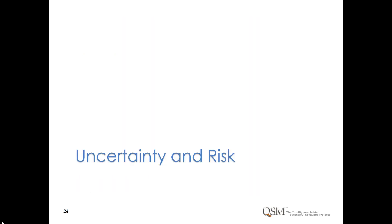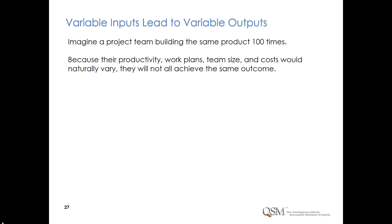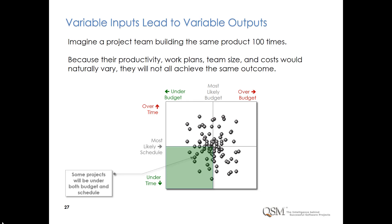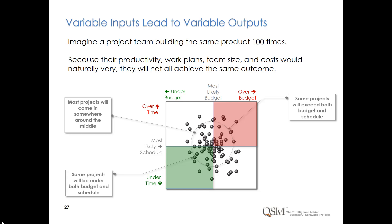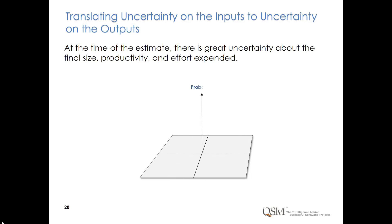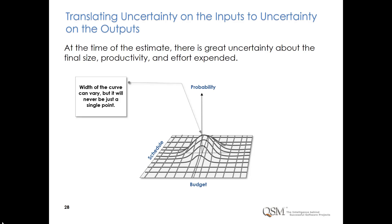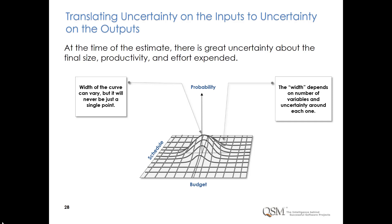Explicitly quantifying uncertainty enables you to manage it, because you can't eliminate uncertainty. Imagine a project team building the same product 100 times — because their productivity, work plans, team size, and costs would naturally vary, they will not all achieve the same outcome. Some will be over budget and some under budget, some over schedule and some under schedule. Most projects will come in somewhere around the middle. SLIM uses Monte Carlo simulation to compute the range of potential outcomes and their relative probabilities. The width of the curve depends on the number of variables and uncertainty around each one.